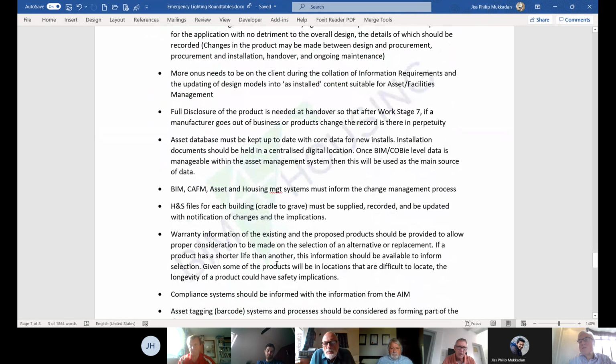So from then on, when you've got that, the replacement of any of the components can be done and checked against that information to make sure that the photometry is the same. And then in terms of the product standard, that will check that the changeover time and the duration and the specification are the same. So the facilities are there for people to do, but I would agree that it's woefully undone a lot of the time.